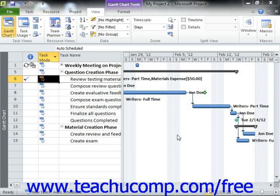When dealing with a project that has fallen behind schedule, these are the tasks whose duration must be shortened if you are to bring in the project's deadline. The process of shortening the duration of the critical tasks in the critical path in order to shorten the project's deadline is also called crashing the critical path.